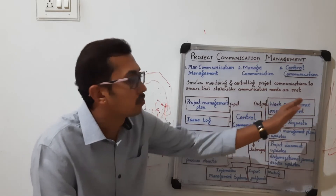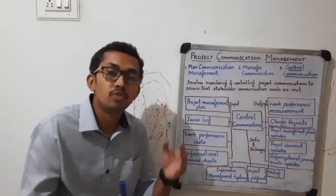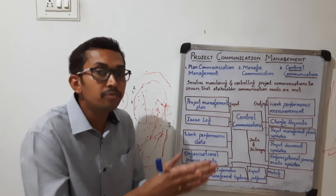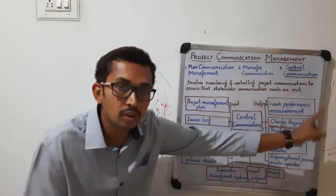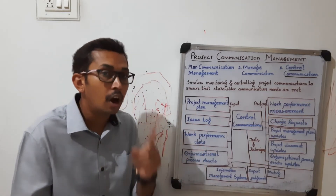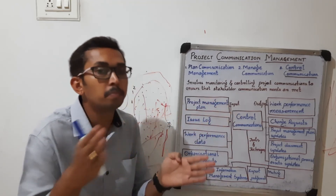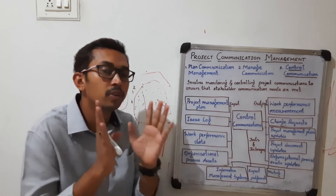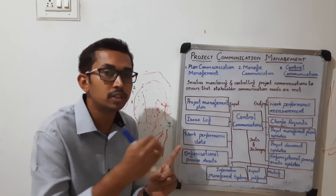The output is work performance measurement. Here we note down the current status and check whether all activities are as per the project management plan. If there are any deviations or lags in activities, necessary action is taken. This also includes checking cost and budget — whether the project is within budget or not.